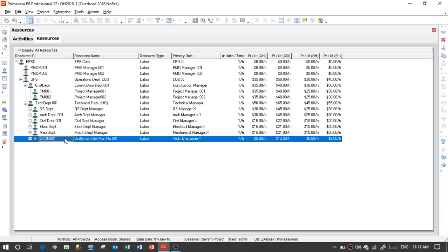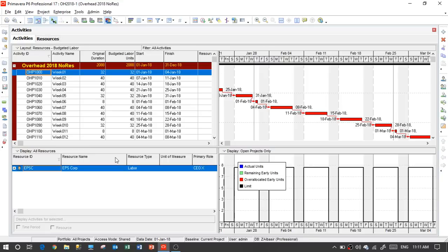And the technical manager has to be sure that they can book only in the project they are working on for the hours assigned, and if they have any extra hours, they have to go and book in the overhead. And this is what we will try to do now, monitoring this overhead. Now, how do we do this monitoring of the overhead?